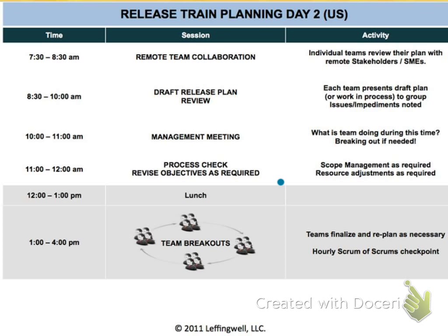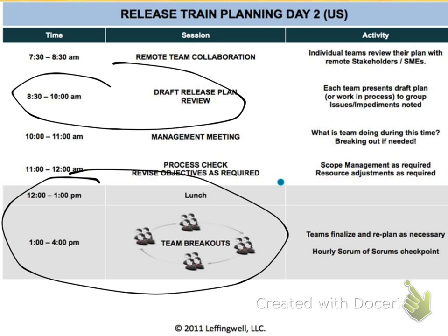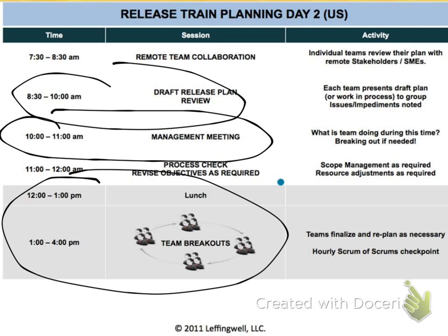Second day meeting, teams usually come in and talk about what they're going to get completed in the next 8 weeks. If there's any changes, you can usually get those somewhere in the middle. And then if you need to, because there are some changes, your teams could then do some more breakouts. But 9 times out of 10, in my experience, you're usually done somewhere around here. You get the team to all agree on what you're going to have completed in the next 8 weeks. And then again, in the second half of the meeting, teams start doing their sprint planning.